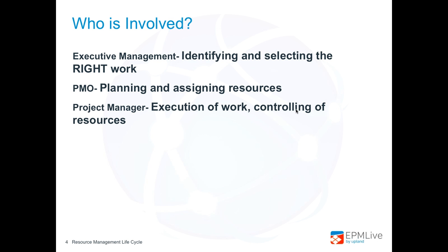The project manager will be involved primarily with execution rather than the planning stage of resource management. Once the resources are assigned, the project manager will be accountable for resource performance. So controlling the resources, controlling the changes that come into the project and how those resources will shift throughout, as well as how they are performing.